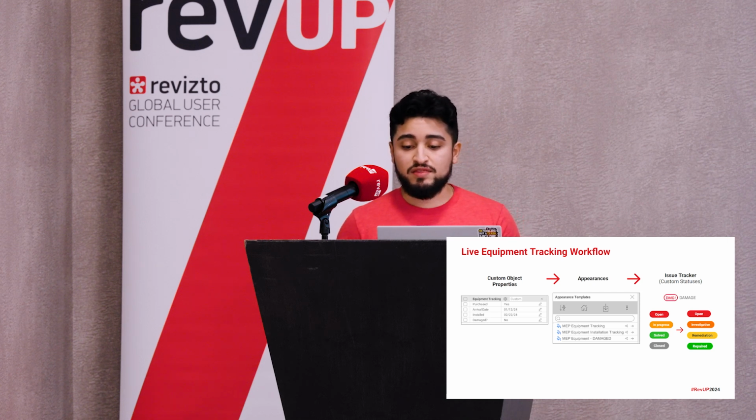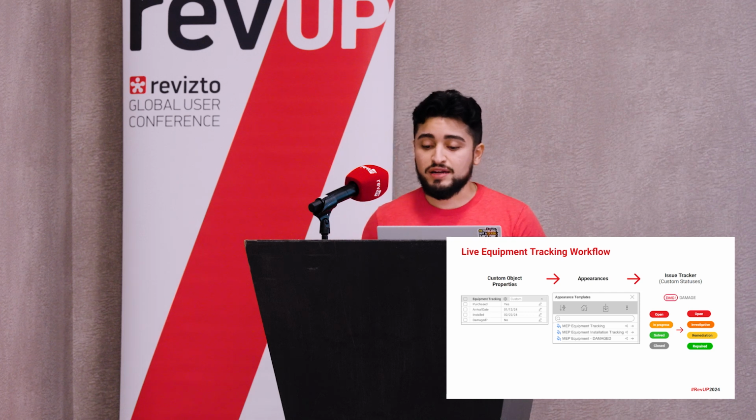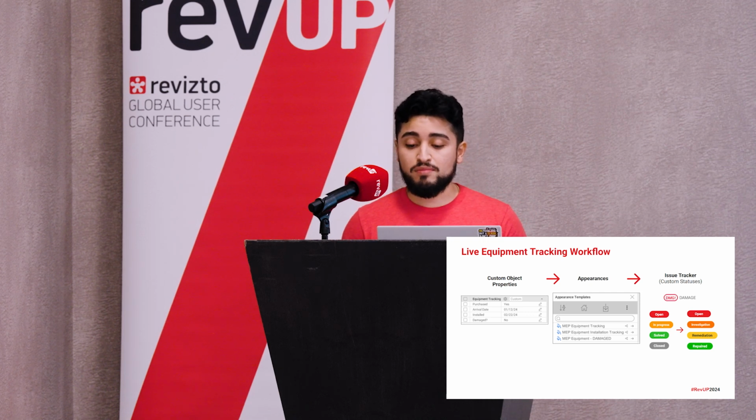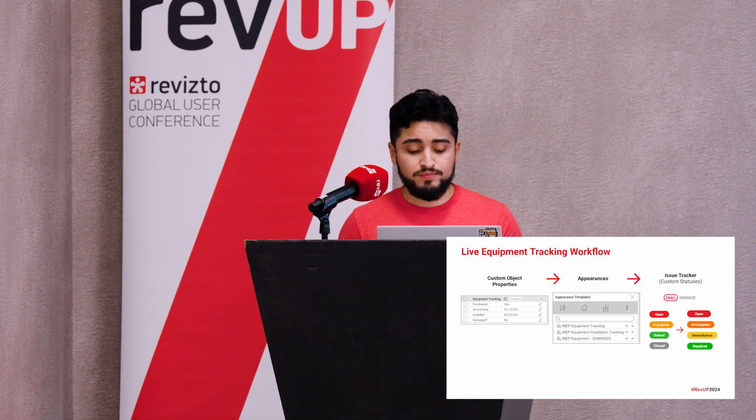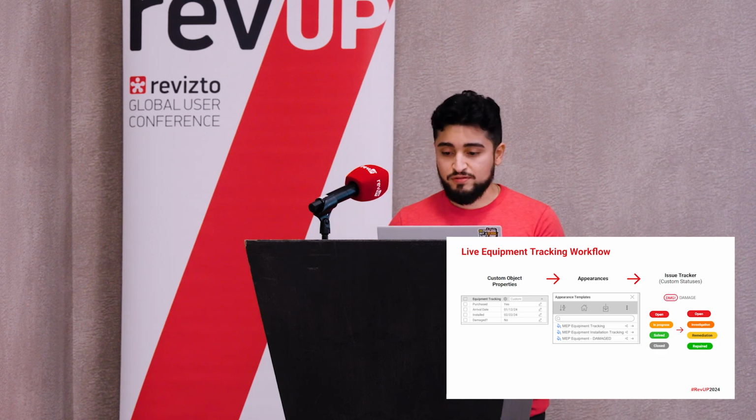And then we're going to hit that accountability stage, that issue tracker, creating a single stamp for equipment damage, item damage, damage in general. It's going to follow a similar process of how we're going to create those custom statuses from those open, in progress, solved, and closed, and making them something more bespoke: open, investigation, remediation, to repaired. So let's hop right into it.